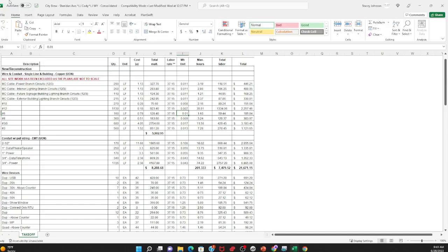Nice. So at least every 30 days they should expect some kind of change if they haven't gotten back with you. And definitely on every estimate, let them know what all of the lead times are because at least that way they can't tell you they don't know, or that you didn't tell them. Yeah, let them know on every estimate.